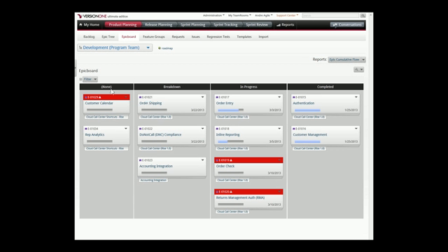So if I'm looking at the release for the call center team, release forecasting allows me to look at our remaining estimate that we currently have in there, what's our projected velocity, which, if I go to the defaults, is based on what the team has done in the past. And I could run this to show me what we should expect if we continue at that rate. I can also run some what-if scenarios. So if I know that we're going to lose a team member and that team member is pretty productive, I might assume that we're only going to have a projected velocity of 25, and how does that affect the forecast compared to the currently scheduled end date.